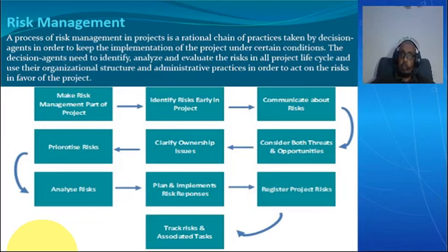The first risk to think about, the second, the third, how some are easier than the other one, of course. Then you go back to analyze risks, then plan and implement risk response. Then you have to make a project risk register, then track risks and associated tasks.